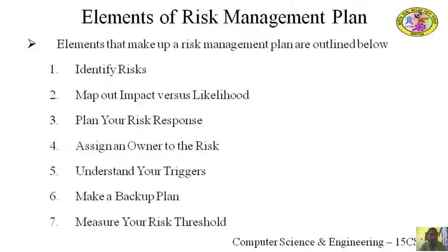Contingency planning includes discovering new risks during project milestones and re-evaluating existing risks to see if any conditions for those risks have been met. Any reclassification of a risk means adjusting your contingency plan just a little bit.